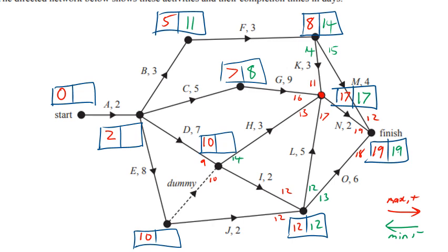And they highlighted this area to us a bit with the other question about what the predecessor for I is. So let's try that again. So we've got 17 minus 3 is 14 already. There's 12 minus 2 is 10. So we choose the minimum, which is 10. 12 minus 2 is 10. So you can see we got that splitting there. And 10 minus 7 is 3. 10 minus 8 is 2. So that's why we choose the 2. And 2 minus 2 is 0. Wow, a lot going on in there.